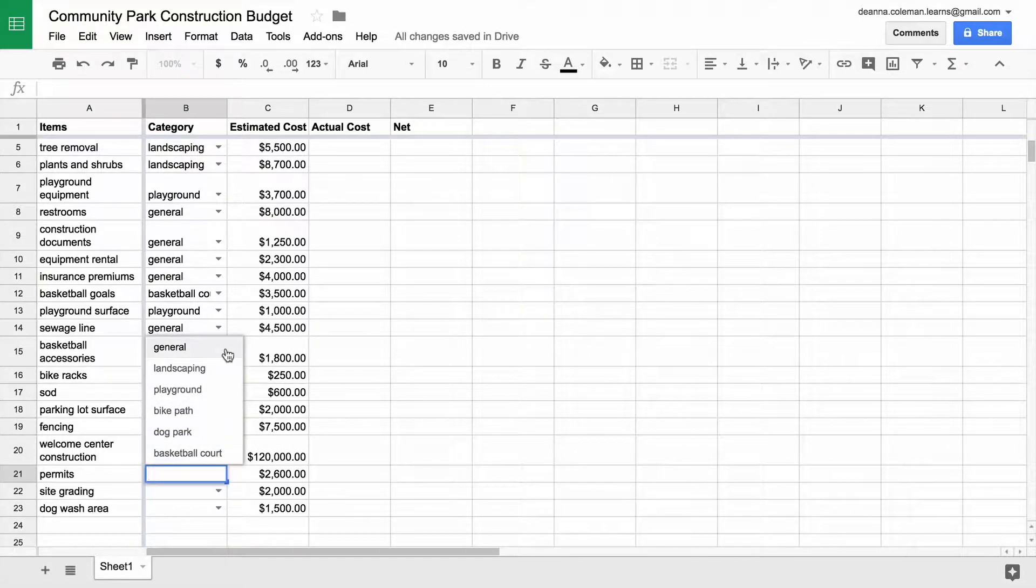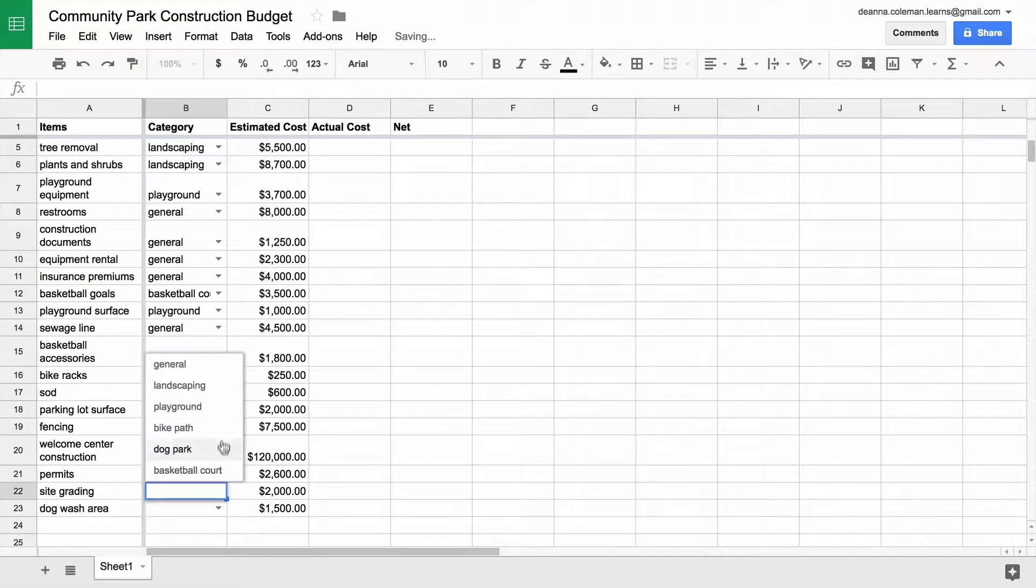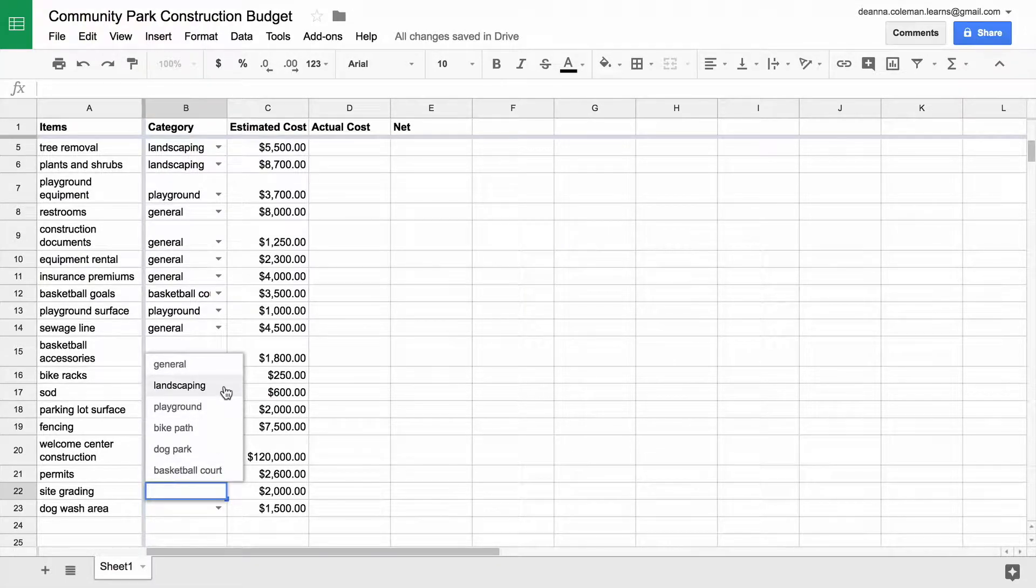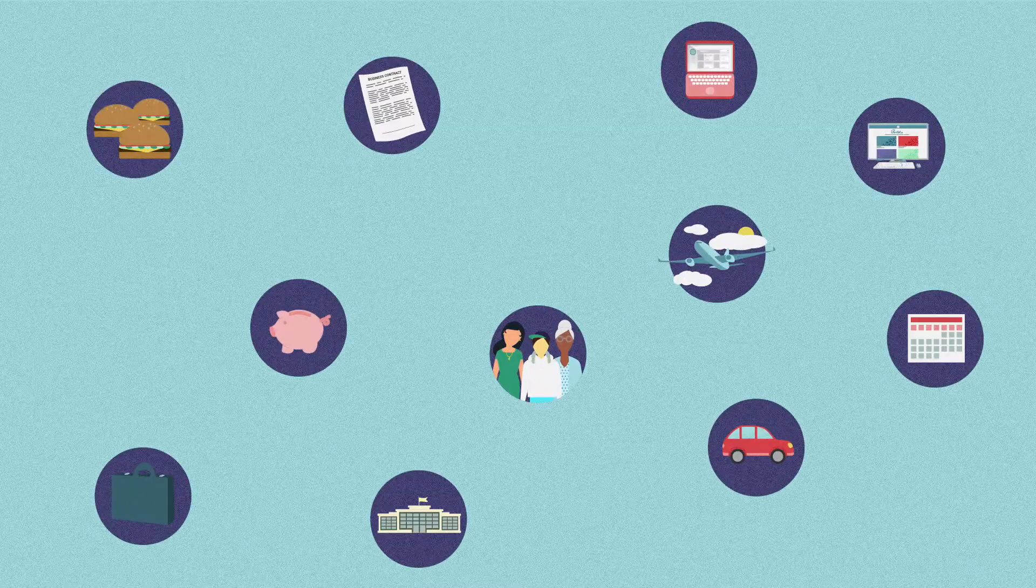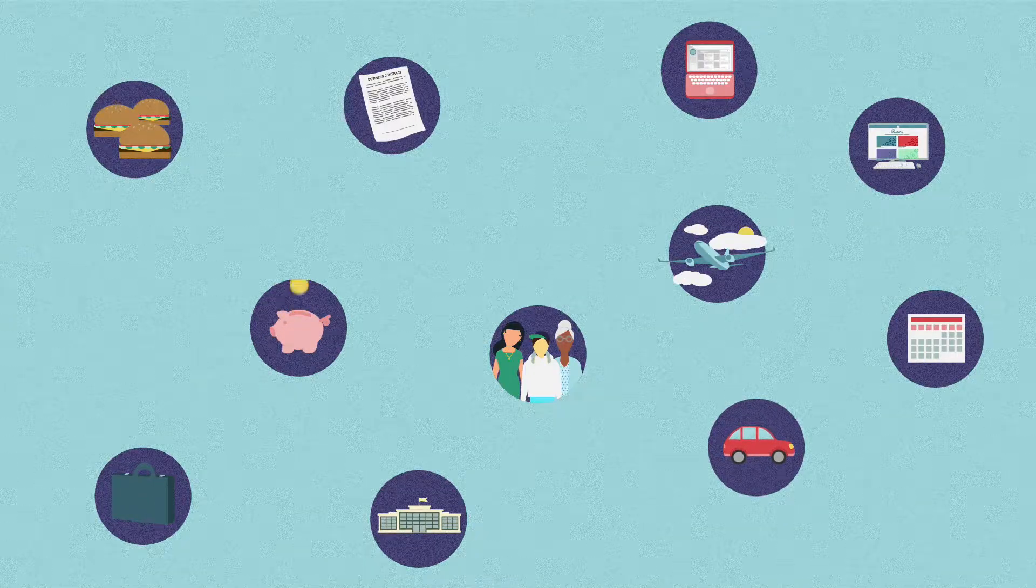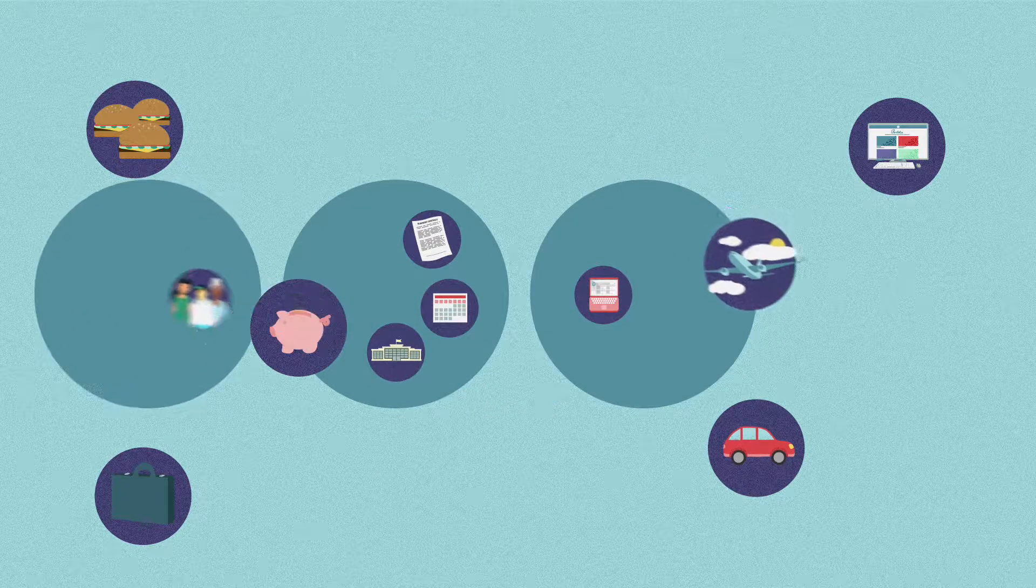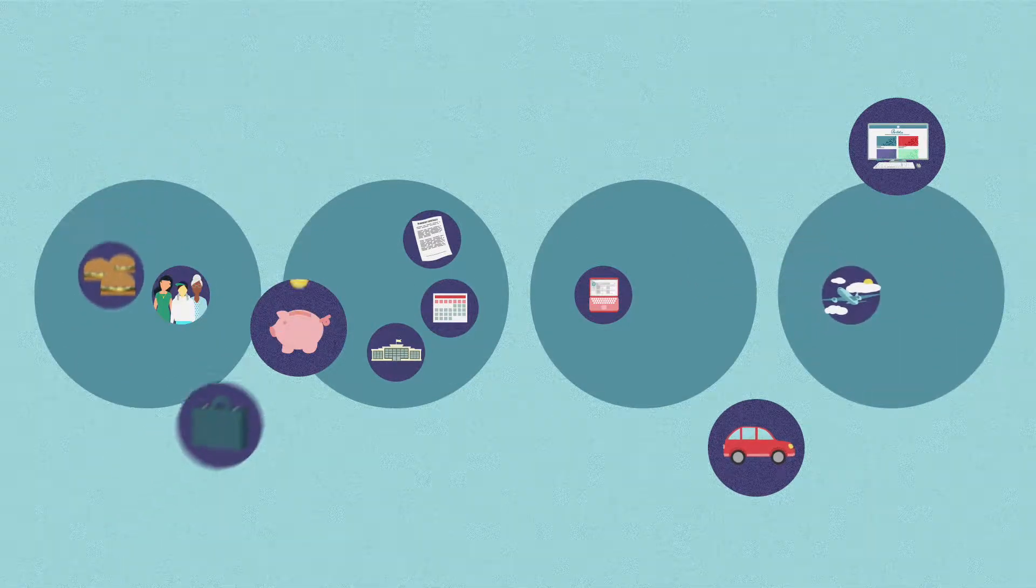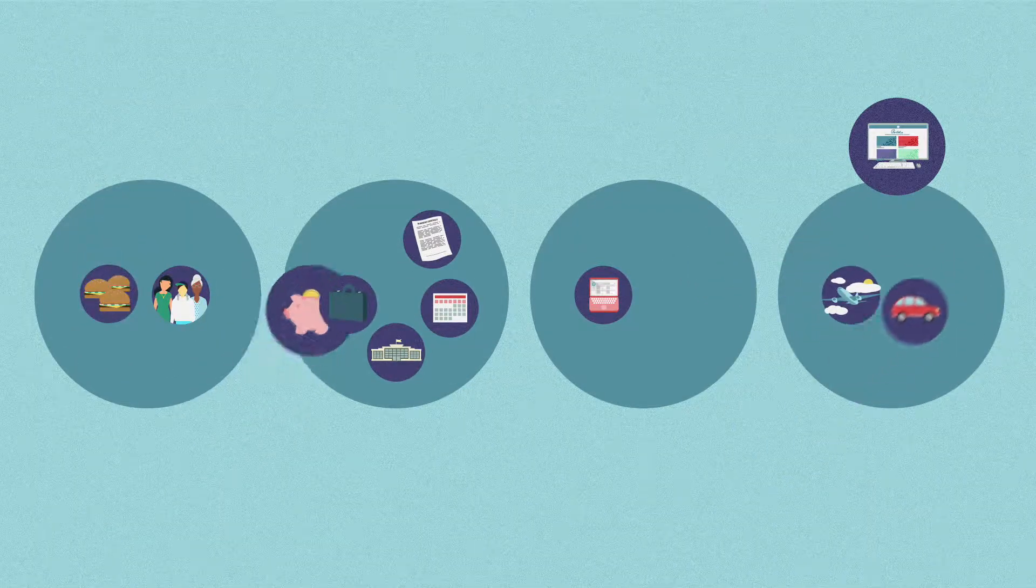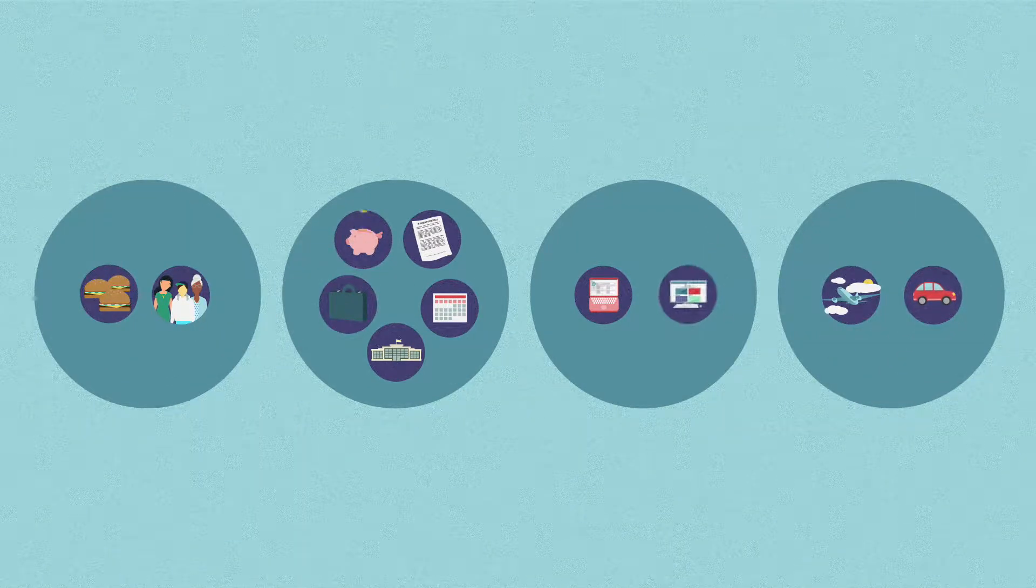This enables you to specify a project area, department, or other category for each line item. It is often up to the project manager to track and categorize costs by type of expense or budget area. Categorizing budget items helps you quickly see if any project categories are becoming too costly so you can make adjustments.